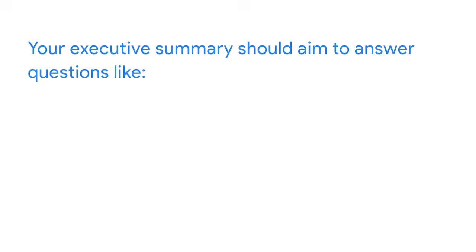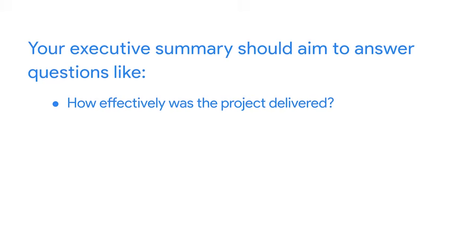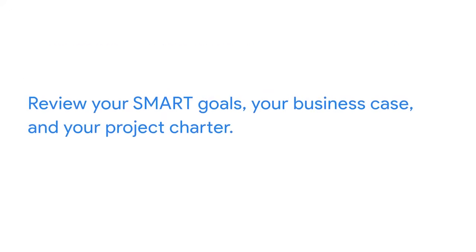Your executive summary should aim to answer questions like, how effectively was the project delivered? And what did we learn from it? In addition to asking yourself some foundational questions, it's a good idea to review your SMART goals, your business case, and your project charter to help you write the executive summary. These will help you reflect on and identify the most important aspects of your project, which are likely tied to key accomplishments and positive outcomes.